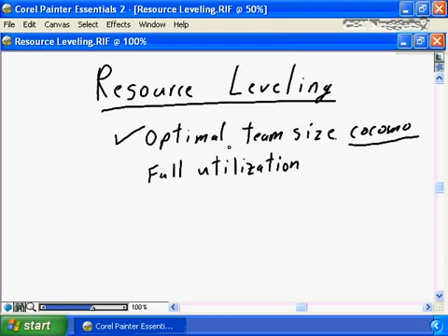If you have a small project being delivered over a short duration, having a very large team is probably not effective. Having a large team on a short duration project means you have a learning curve, and ramp up, ramp down time for multiple resources, which will probably result in an underutilization of the overall resources. You'll spend as much or more time on ramp up, ramp down, and training as you will on actual project delivery. So your team size needs to be based on the overall duration for your project.